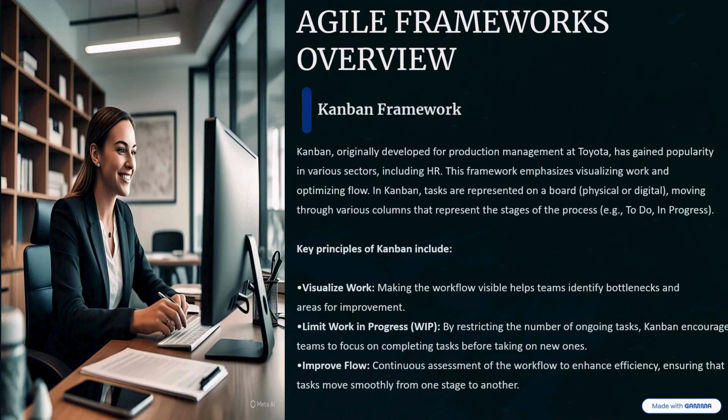What is visualizing work? Making the workflow visible helps teams identify bottlenecks and areas of improvement. So what is WIP? Limit work in progress. By restricting the number of ongoing tasks, Kanban encourages teams to focus on completing tasks before taking on new ones. Continuous assessment of the workflow to enhance efficiency, ensuring that tasks move smoothly from one stage to another,